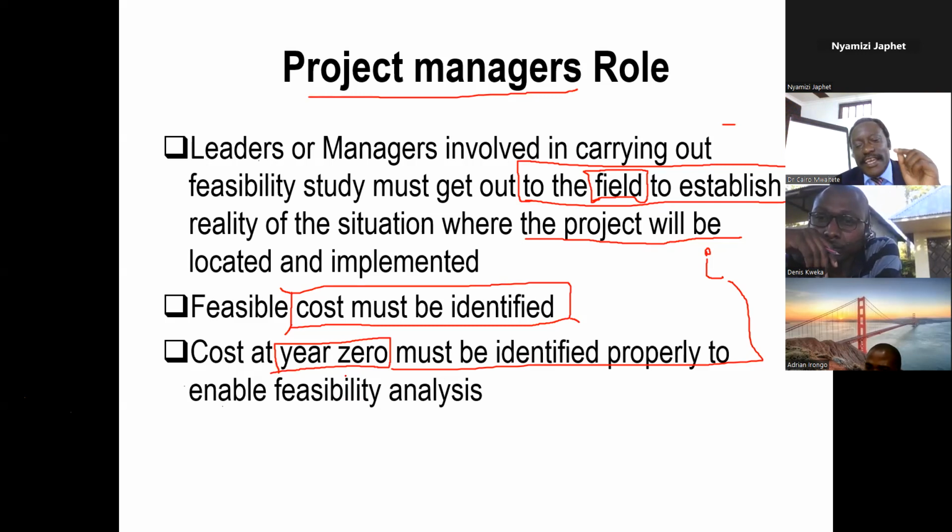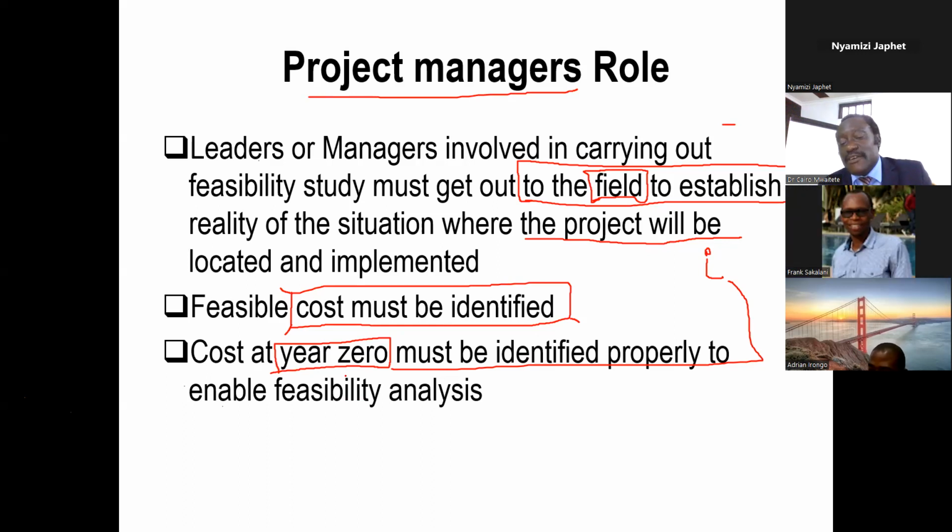No. If you are doing a donor-related project, you will do what is called needs assessment. You assess the need. But if you are going to have elements of profitability within your project, you will need to be very careful. So it will be a mixed approach. You will need to understand, is it feasible? In some cases, donors require elements of sustainability: how you will sustain yourself by the time the donor pulls out.